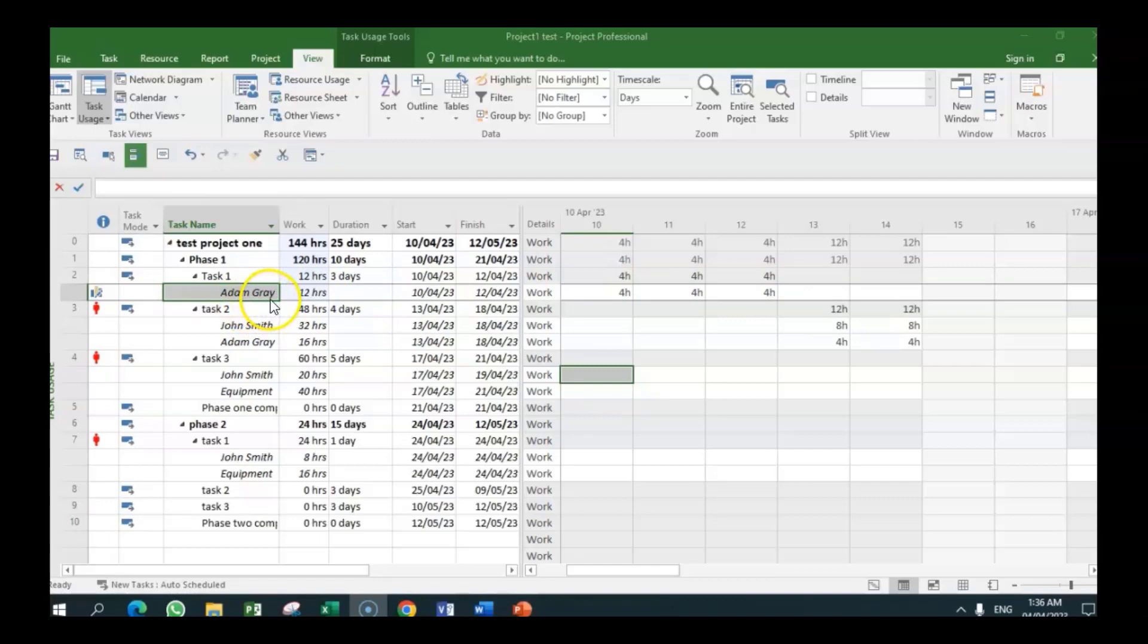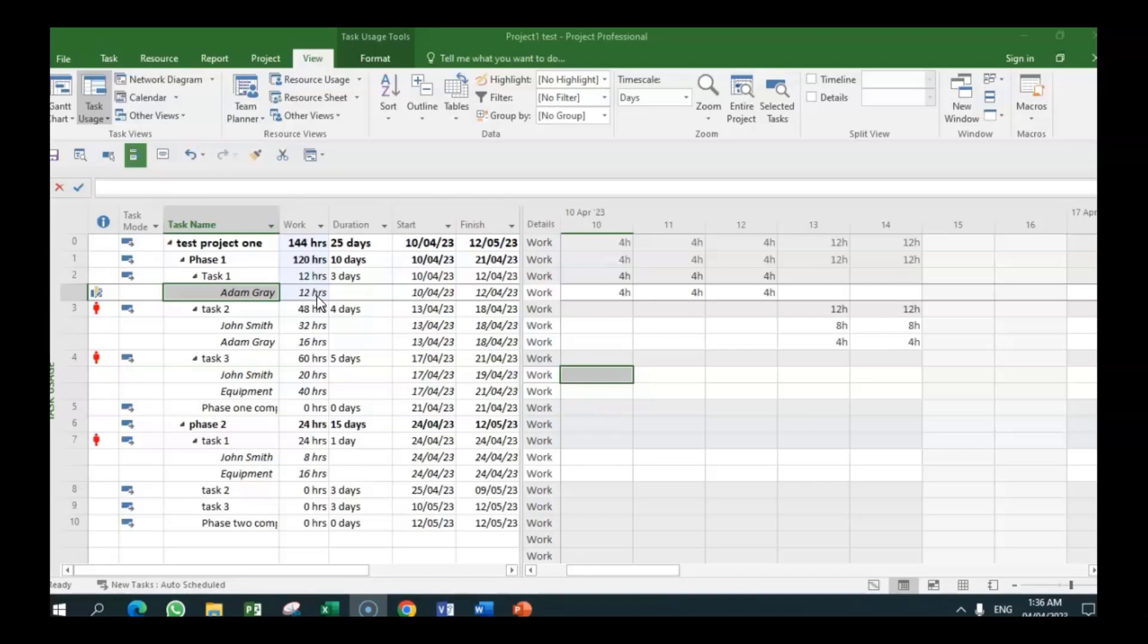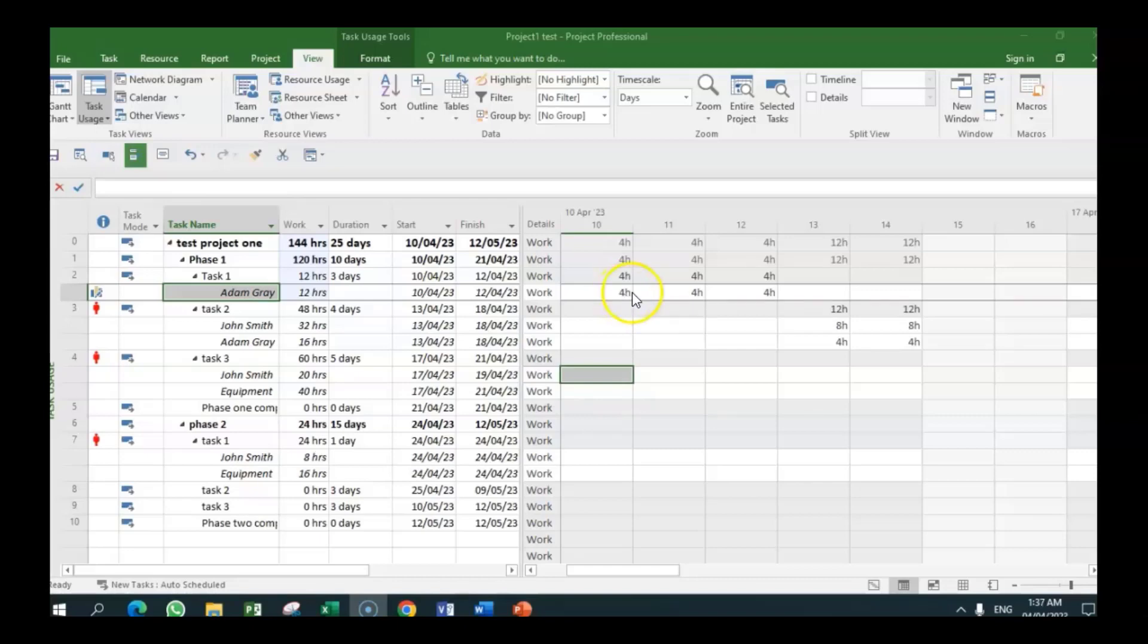Now, sticking with the Adam Gray situation on task one, you can also ask some questions. Is it possible to reduce scope and therefore have the time reduced from the 24 to the 16 or from three days to one and a half days? Is that feasible? And that means a management decision. Another thing you can ask: could we bring on somebody to work overtime? And that is going to add cost. So somebody who is coming could probably take up additional four hours. Why? People are allowed to work 12 hours a day. So we're going to have to schedule it so that somebody can work an additional four hours. The four hours is going to be overtime. So this task is going to get the 24, but there's not going to be an over-allocation. But with everything, you have to weigh the pros and the cons of every move.